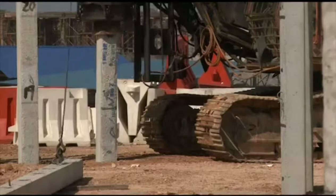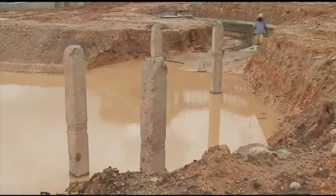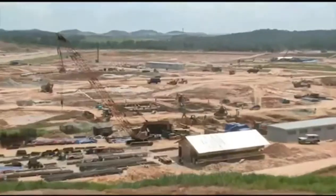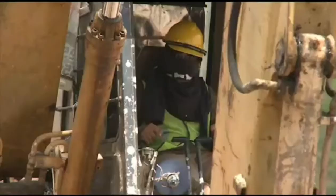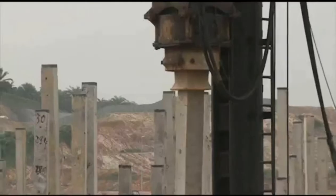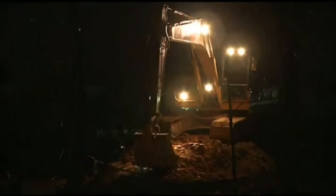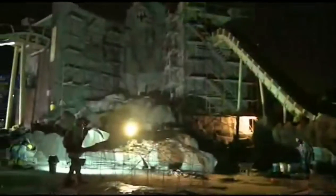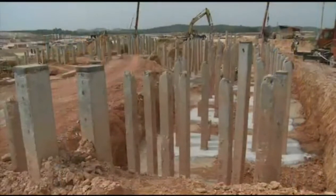The journey begins with foundation works, earthworks and structural works that were carried out under less favorable conditions. With daily continuous heavy rainfall beyond our expectations, progress was delayed for 2 months, and piling work was disrupted and excavated pits were flooded with rainwater. Adding to that, insufficient information, scope gaps and incomplete design also greatly affected us. A timely handover seemed impossible at that time, but even with this great pressure upon us, we did not give up. With extended working hours, sometimes stretching into the wee hours of the night, coupled with proper management of resources, we achieved our first milestone, completion of piling works on 13th July 2011.